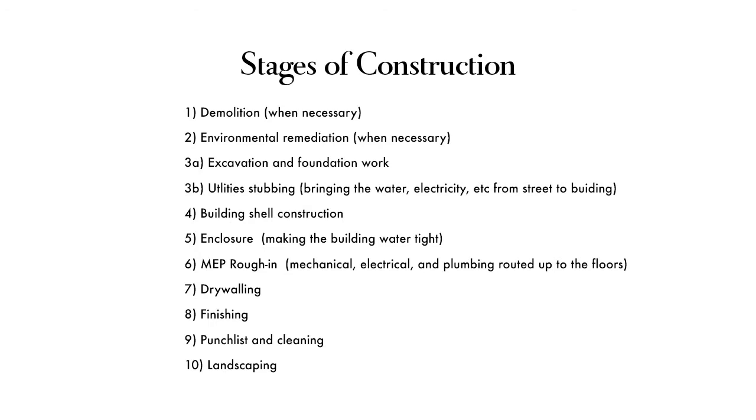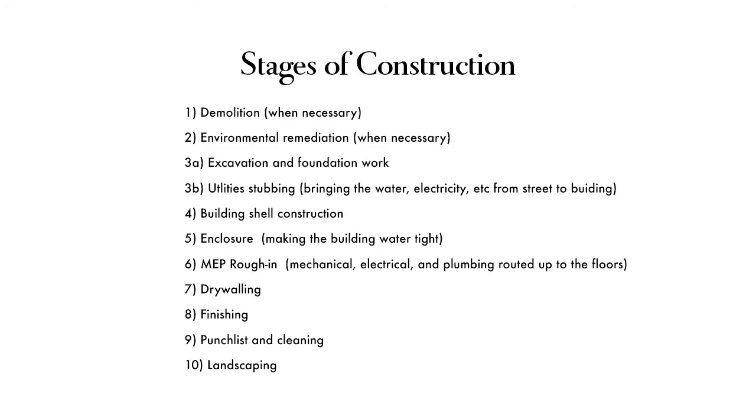And while you're doing that, you're running utilities. And so, where does your water come from? Where does your sewer come from? Right. All those different services. And then as you go up with the building, you're concerned with first the structure, and then within the structure, bringing up all of those services into the building. And the riser. And then, through risers and all the like. And really, you're leaving the outside site not alone at that point, but more or less alone at that point, because you're not going to do your landscaping till the tail end.